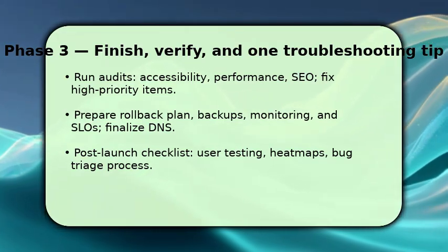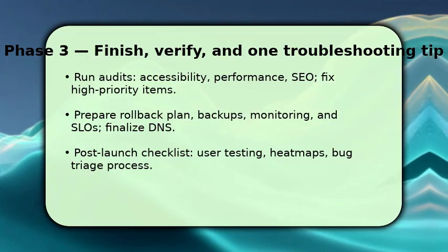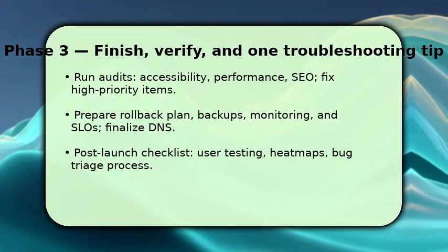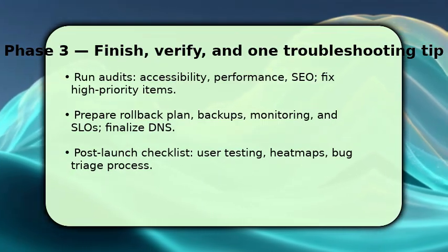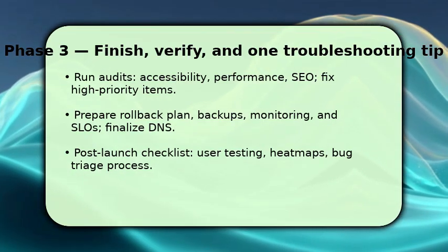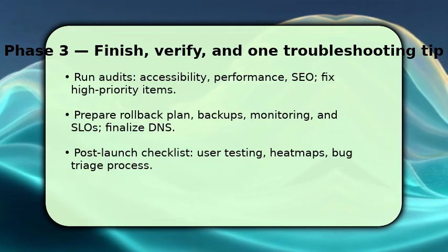Once those pass, prepare a rollback plan, backups, monitoring, and SLOs. Update DNS during a low-traffic window. After launch, run user testing and heat maps to validate assumptions and triage any bugs via your board.